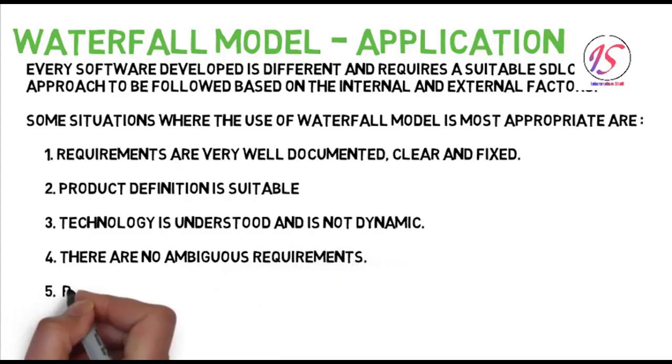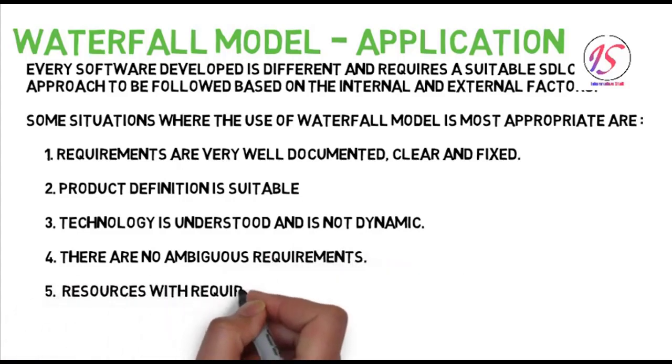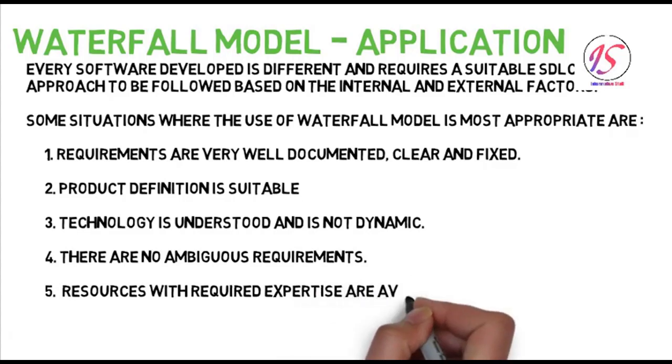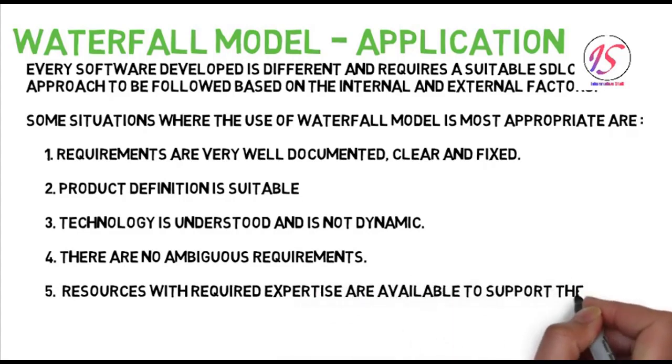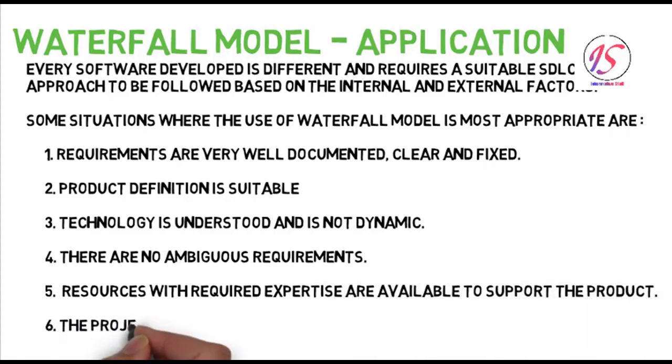Technology is understood and is not dynamic. There are no ambiguous requirements. Resources with required expertise are available to support the product. The project is short.